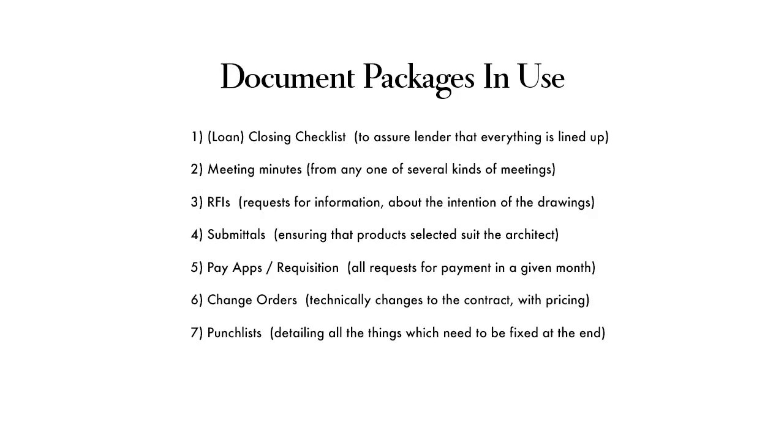Yeah. Along with RFIs in that same bucket, I would put submittals, and so again, you've got all the specs that you have from the beginning of the project, where the architect and the engineers have specified every detail of the project, the kind of quality and what they're looking for in the different fixtures and so on. Exactly. So they basically say, this is what we want you to buy and build and install, types of elevators, types of doors, windows, everything that you could possibly have involved in the project. But then the submittal process is basically echoing back to the A&E team and to the ownership team: this is what we're thinking of going with.